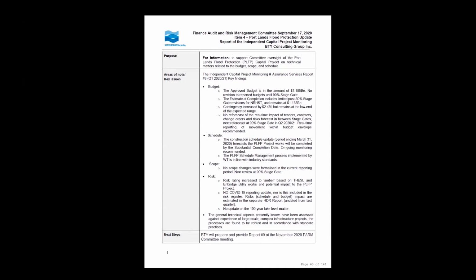So we look at those issues. As we go to tender, we do have the requirement for bonding for all of these contractors, for all of the subtrades. We try to limit the size of packages, although on a project like this, they are still pretty large packages that we're issuing. But part of the due diligence is that they must be able to bond. We get letters and performance bonding out of their bonding companies that attest to their ability to complete the work.